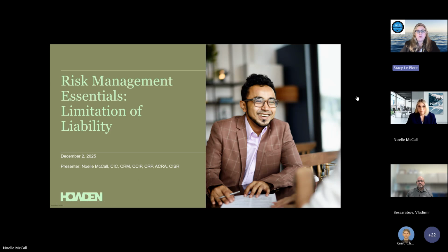Have you ever spent hours reviewing and negotiating a contract to ensure insurance limits were applied, only to find out that when a claim was filed, there was a limitation of liability clause that limited access of insurance, possibly limiting it to as low as $100? That is exactly what we are talking about.